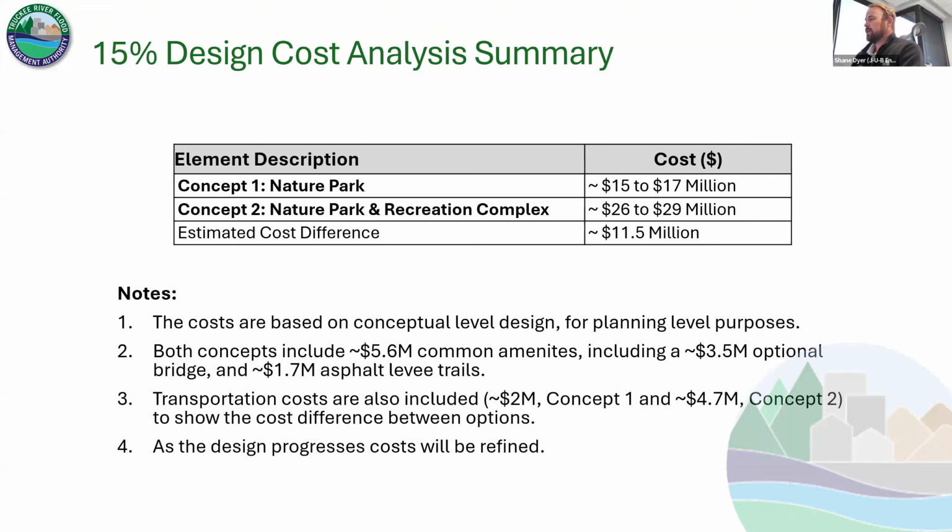Next slide. Yeah, and I think just to add a little bit on those costs, they may look a little high, but that's because we have to include the roads, which generally wouldn't be part of a park cost per se. It pumps them up a little bit, as well as some common amenities. No matter what, we're probably doing trails on top of the levees, and so that's just a cost that's going to be there. Those are kind of the high end, to really show the difference between the two different parks with everything all in.